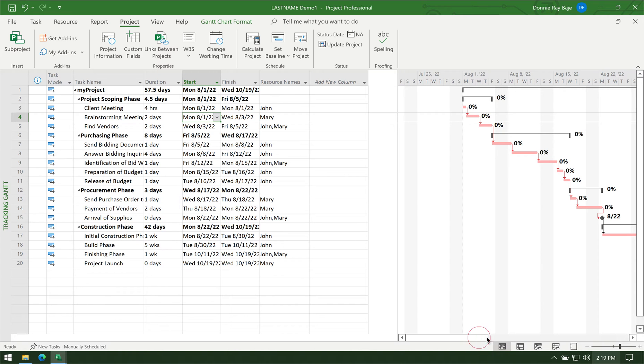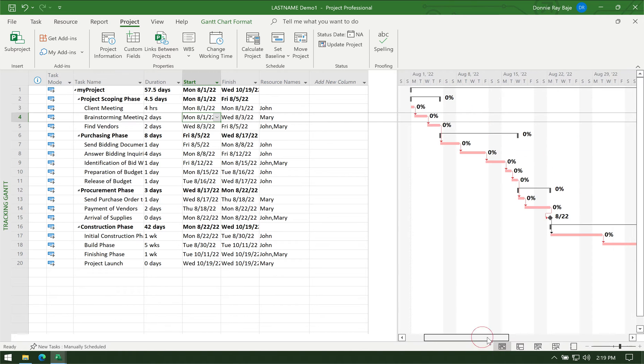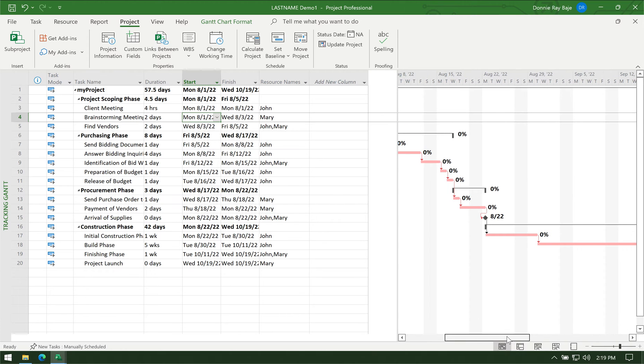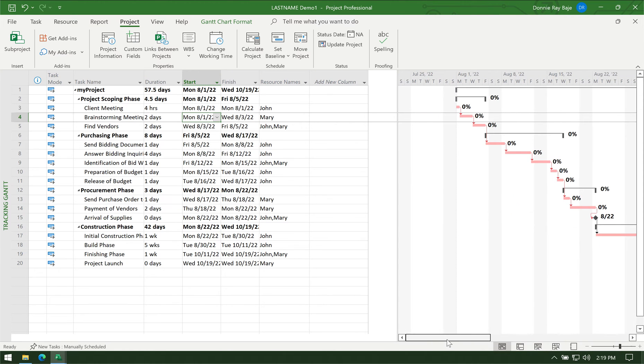The idea is that you have to prepare the data from MS Project and then export it to Excel. Excel is the one that will create the S-curve for us.